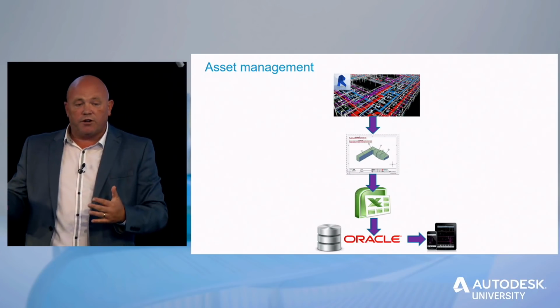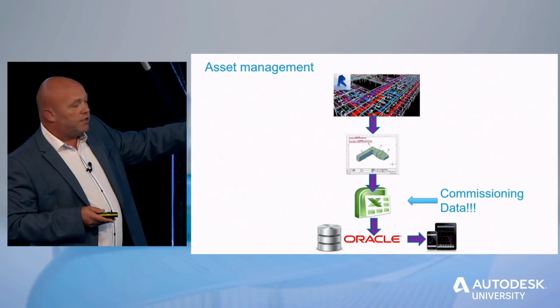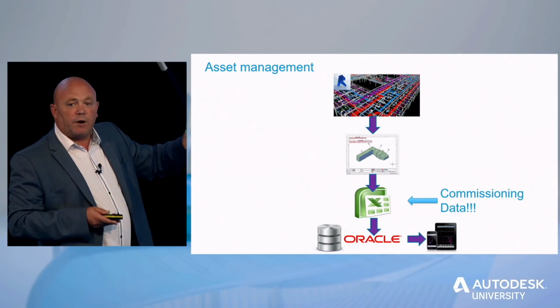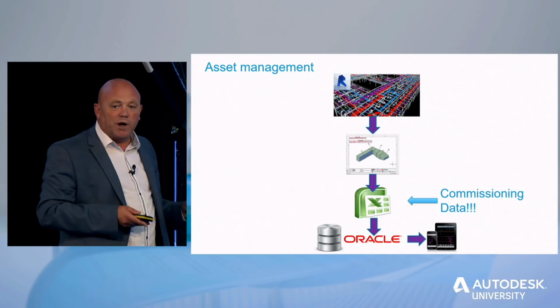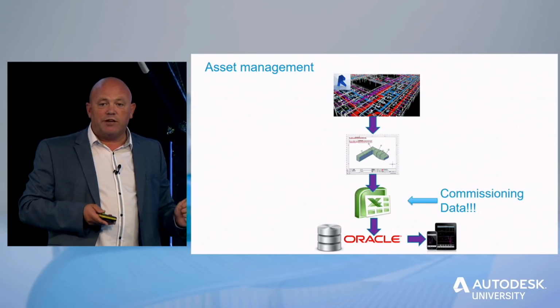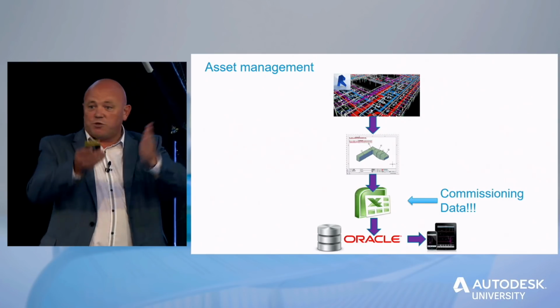that the university are going to need during that maintenance period. And it's that commissioning data that we need as it's being fitted out. If you've got 10 fan coil units being delivered to site, how do you know which one's going where? You've got to capture the serial number. If every one of them's different, and they're sent to site, how do you know which one's going where?